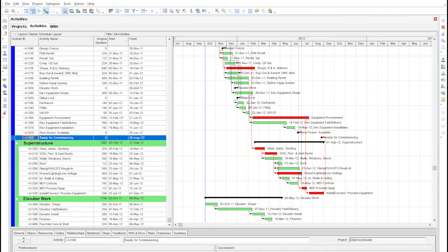Yeah, so the question was, wouldn't assigning constraints cause CPM interruptions? Absolutely. And that is why GPM avoids them. But if you wanted to maintain objects on their planned dates in P6, unfortunately, that's the only option. Yes, can you hear me? Yep. Yeah, that question came from me. My name is Mohsen, and especially constraints that are forwards, when the schedule is doing the forward pass, in my experience it's most likely going to interrupt the CPM calculation. So what's going to be the benefit of that schedule anyways? Yeah, and that's the idea.